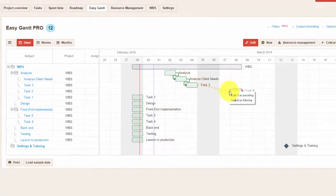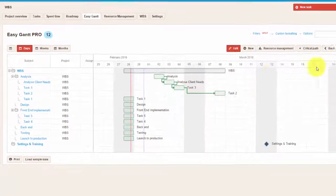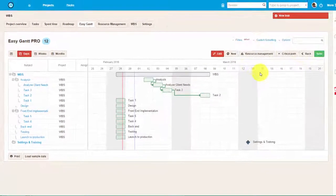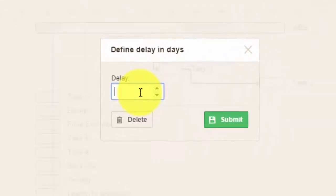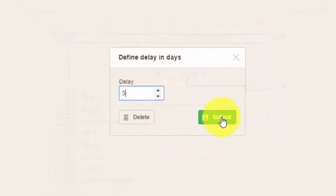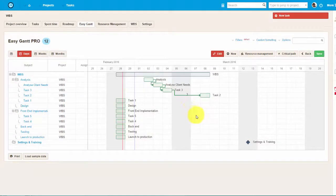Meaning, one task cannot start before the other one is completed. And by clicking on the arrow itself, you can enter the delay time.